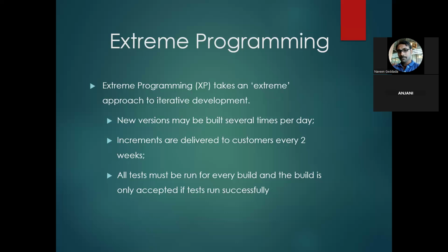In those 5 working days, you have already completed your user login screen design on the third day itself, and it has been moved to the testing team, and the testing team has tested the login screen based on the acceptance criteria or the test cases they have prepared. Once the testing is done, then we will say the story is done.